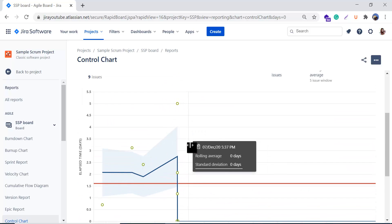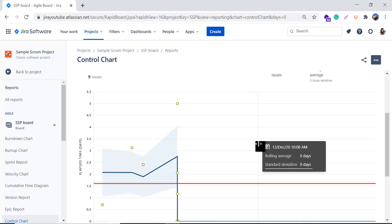Before understanding the control chart, a few terms are necessary: cycle time, lead time, rolling average, and standard deviation. Cycle time is the time spent working on an issue — typically from when work begins to when it is completed. Lead time is similar but is measured from when an issue is logged, not when work begins, until work is completed. This is the key difference between cycle time and lead time.